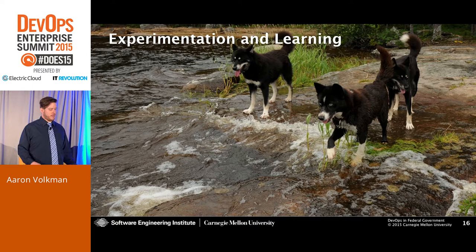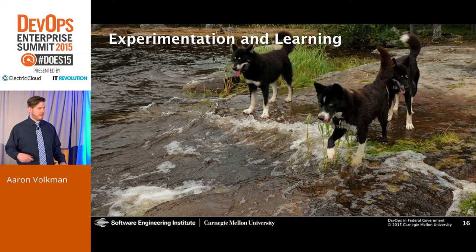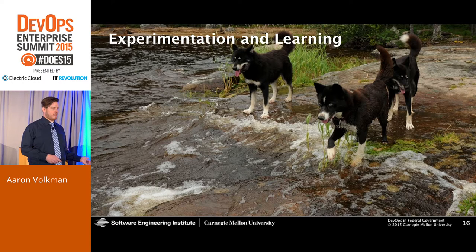The result of this was we encouraged a little more risk-taking. We were able to do things without the fear of repercussions. All the risk-taking that we were taking, of course, was mitigated through proper back-out strategies or doing small pilot releases, mainly small canary releases, all those techniques that I'm sure we're all a little bit familiar with.